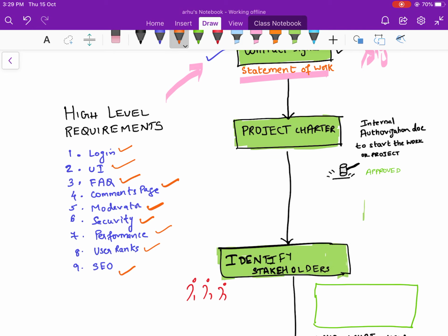And what do you get over here? We get two important outputs, that is the requirements document, and you'll get the requirements traceability matrix, RTM. RTM will tell you the origin of the requirement, the objective of the requirement, and who is owning the requirement. So you can remember it like O cube. You should be able to answer many PMP questions from that. So the requirements document gives you the list of requirements. Okay, more detailed requirements. The list of requirements is there in the requirements document.